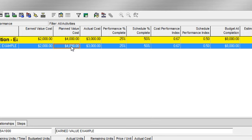Planned value tells us this is the dollar amount we should have earned as of this point in time. In this instance, it's $4,000.